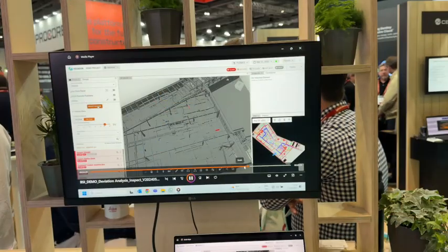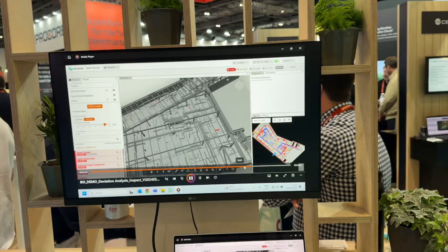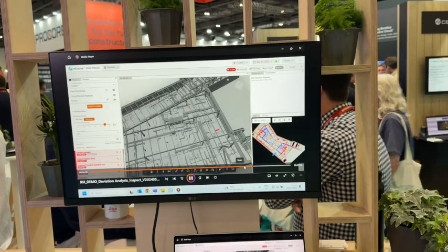Simply, it comes in photo form tied to a floor plan. And then on top of that, you've got an AI piece which runs over the top, takes their program and the Revit model into account, and then says, well, actually, you're X% complete. And we're using the photos to compare that essentially. So again, they can make sure that their trades are staying on program.